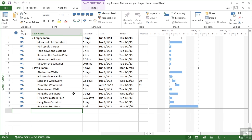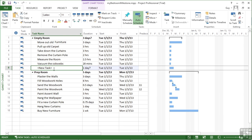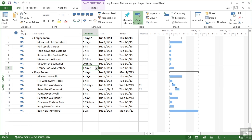To add a milestone task, we simply add a task as normal. Go here, insert a task. Remember that when you right-click, it will always be inserted above the current line. Inside here, where I write the name of the new task, I'm going to put 'empty room milestone.' To make this task a milestone task, I simply give it a duration of zero — not D, M, W, just zero.